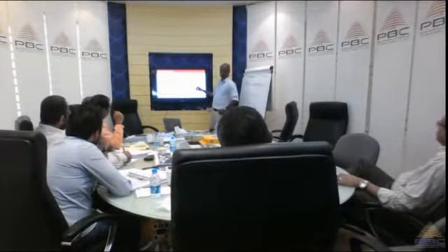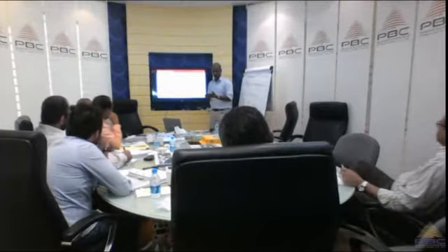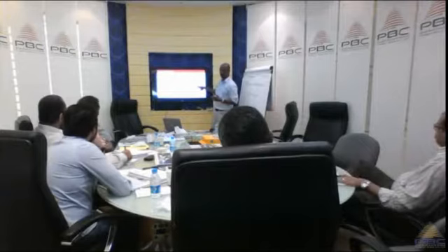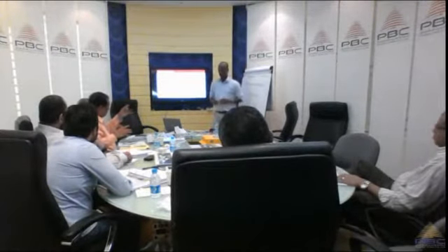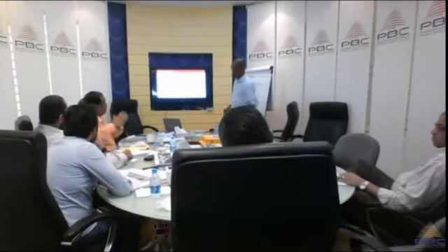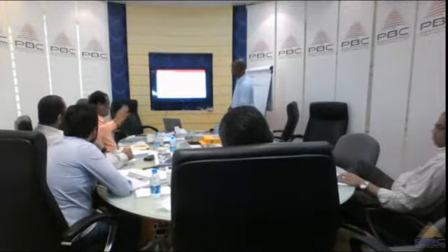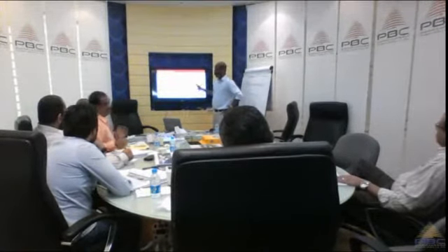Right. Okay. And we end up with what? We come up with work performance information. So this could be reports saying everything is fine, or there's a deviation, or we need to do this, or change requests. Sometimes there is a variance requested by the stakeholders. Right. Sometimes they give additional scope with additional time. Exactly. So if there's anything we need to change, we issue a change request.